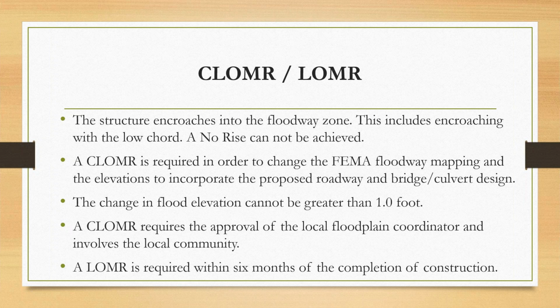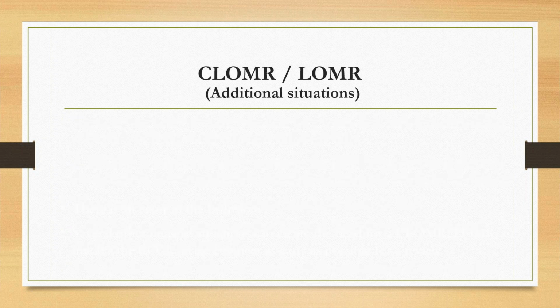And then let's say that we get a CLOMAR and we do the construction. Within 6 months after completion of construction, we have to do the letter of map revision. Just because we got a conditional letter of map revision, FEMA will not change the mapping. They want to make sure that it was done according to the plans, and so we're going to have to go out and survey it to see, did they do it according to plans? And that's what goes into their letter of map revision. And this all costs money, a significant amount of money.